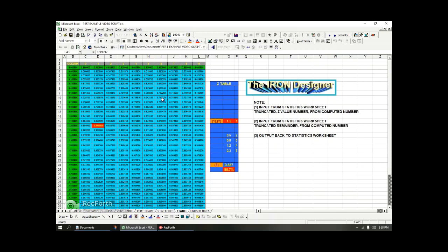But for construction management, even if you're within 0.5% accuracy, I think that's okay because, are you going to work half a day or something on a construction site? The answer is no. You're going to work in the unit of days. So the 1 is telling me that I'm in column 1. So here's column 1. My standard deviation is 1.21, so my row is 1.2, and I highlighted it here for you. I'm in column 1, even though the standard deviation was 1.21. I'm trying to show you the breakdown.